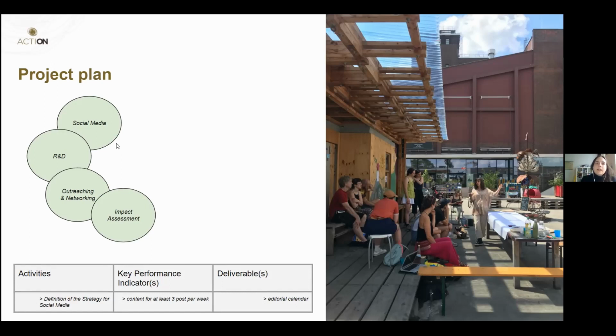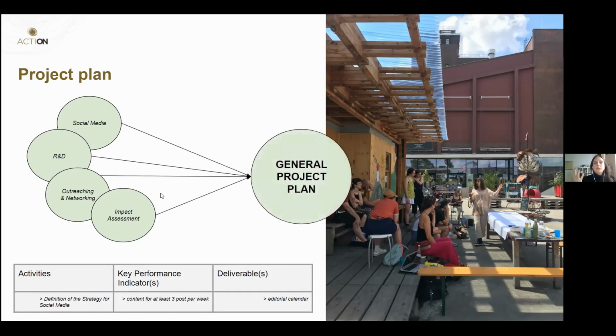The activities planned within every circle were then converged into the general project plan. And the main advantage of this procedure is that it allows the organization to co-create the project plan from the most specific level. It also ensures commitment to the project plan because everything is co-created by the people, and the people are the ones deciding what they want to do.